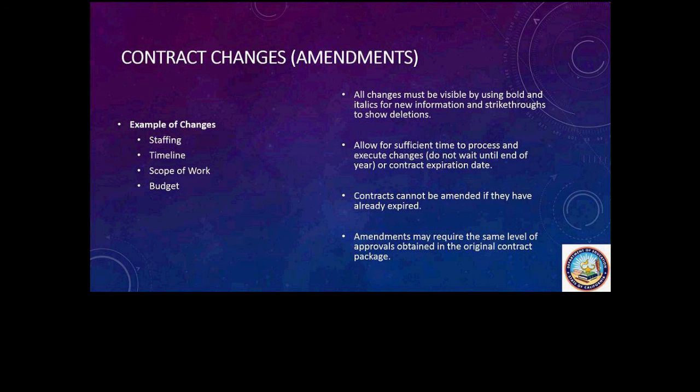It is also important to notify the CDE contract monitor as soon as possible when there is going to be a contract change. A contract cannot be amended at the very end of the contract period or after it has expired. Another important note, amendments may require the same level of approvals obtained in the original contract package, so it is very important to allow sufficient time for processing the amendment.